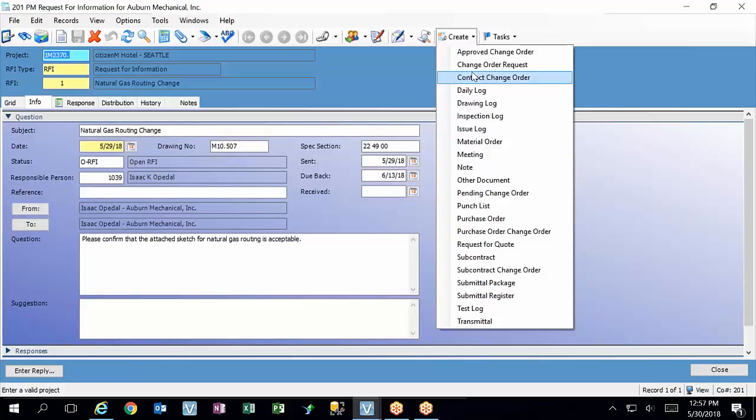And then you can also start the whole process at an issue. I mean, it gets a lot of tedious stuff. Oh, I've got all these issues I'm documenting. Oh, and then an issue becomes an RFI. And then an RFI becomes a PCO, and a PCO becomes an ACO. Then they're all related, and you can say, oh, where did it start? If you don't go from RFI to PCO, then it's not related. Oh, gotcha. Right? That's just my understanding, that it won't be, because otherwise it won't know.